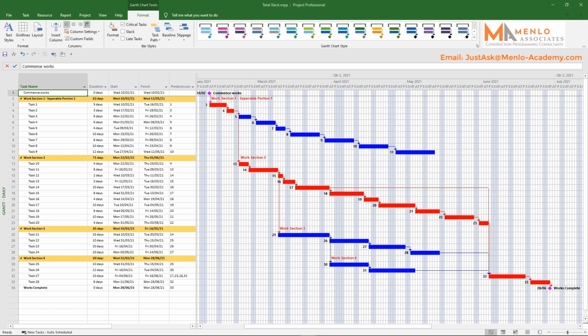Looking at the total slack on tasks can also help us at the planning stage. For example, we can see in advance how increasing resources to a task can keep it from turning critical and keep the project on track. Project makes this information viewable with a specific total slack column. First, we need to add a new one to the program.